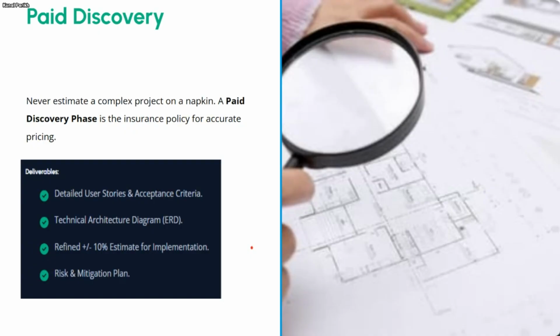So in certain cases, it's important that you identify the discovery process and the effort that you're going to spend in it. There are various parameters to it: how complex is your prospect, how many teams are involved, how many stakeholders are involved, how many solutions are they going for, and basis which you identify that it's better to go for a paid discovery than a free discovery.